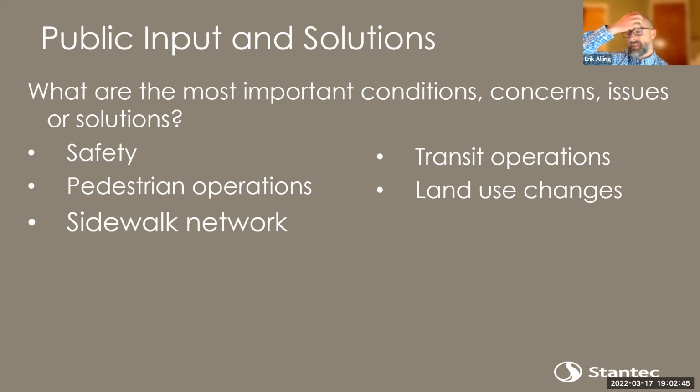Well, I guess I can respond to part of that. So it's in the recording, but any impacts outside of right of way, those do get compensated. It's all part of the Uniform Act. So there's formulas that the state uses to determine the values, and it's a pretty simple formula, but it does compensate any property that moves, either as a permanent or a temporary easement, to either cover construction or cover maintenance after the path is built.